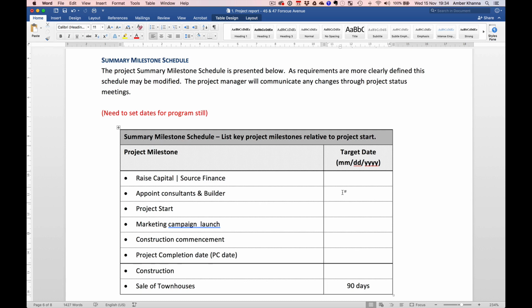Another thing that you'll have to do presenting something like this, you've got to get all the costs from an architect. So if this already has plans and permit, you would have received the plans and permit, and you would have received the copy of the planning permit conditions. I would pick up those drawings, find out where that architect is, give a call to that architect and say, look, I'm planning to buy this property.